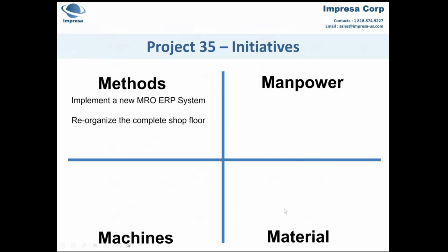The first was to implement a new MRO ERP system, and the second was to reorganize the complete shop floor. Using problem-solving techniques, grit and determination, the incremental improvements were deployed over time, and at the end of the project, a consistent 35 to 45-day engine turn time was established.